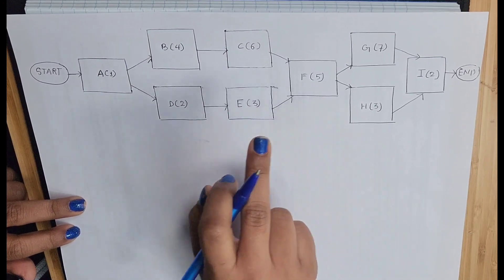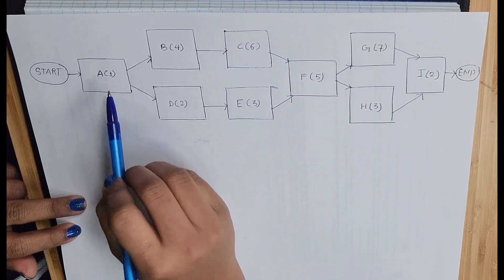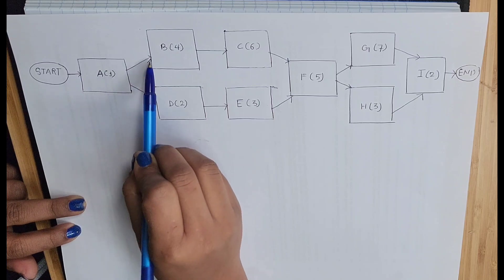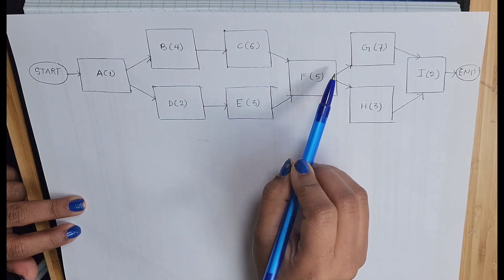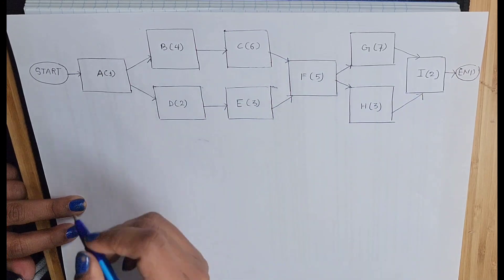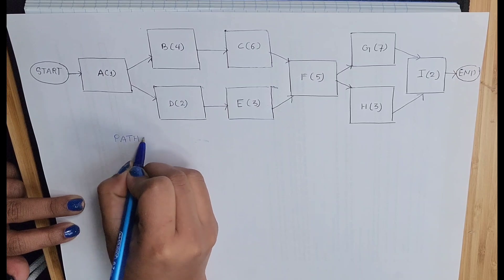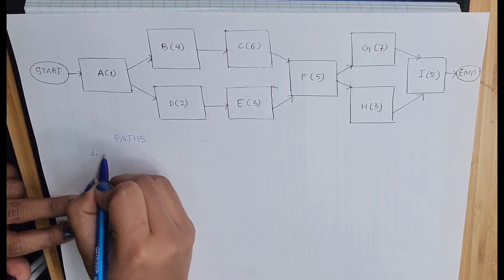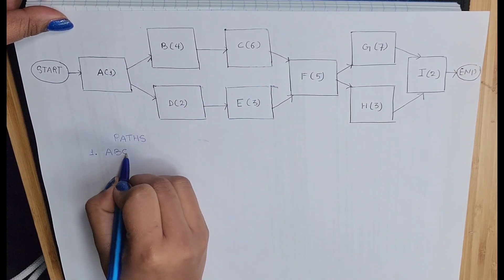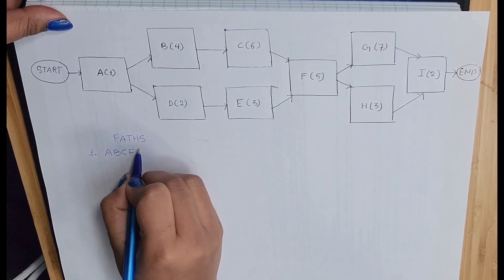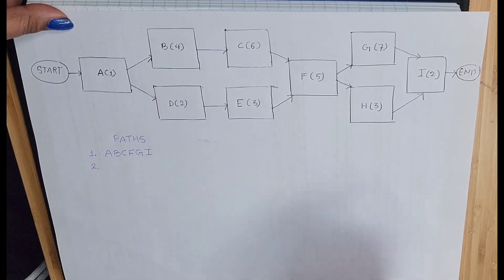All you have to do is calculate the duration of each path first. So first let's see how many paths are possible to start this activity and make this activity completed. So we can go through A to B, B to C, C to F, F to G, and G to I. So I'm writing here path. My first possible path is A-B-C-F-G-I.